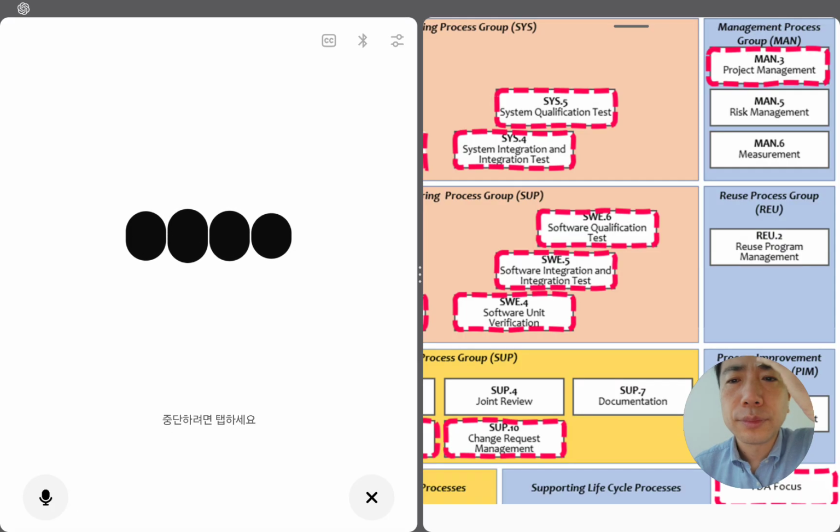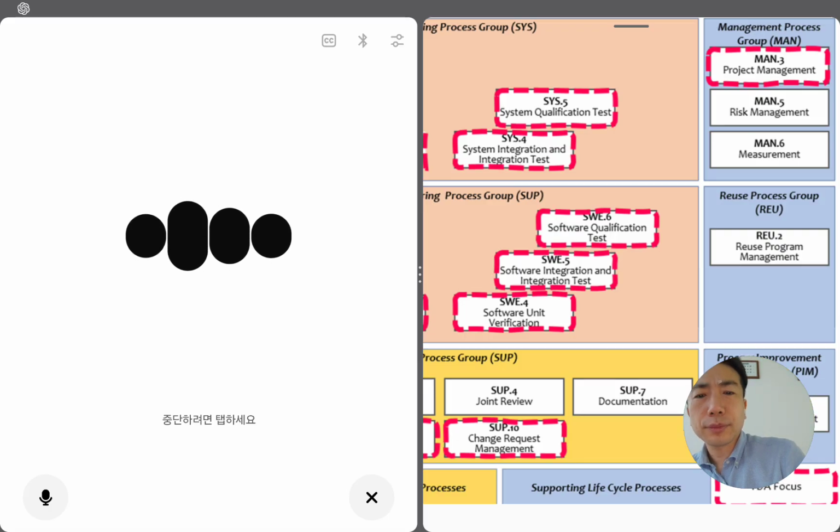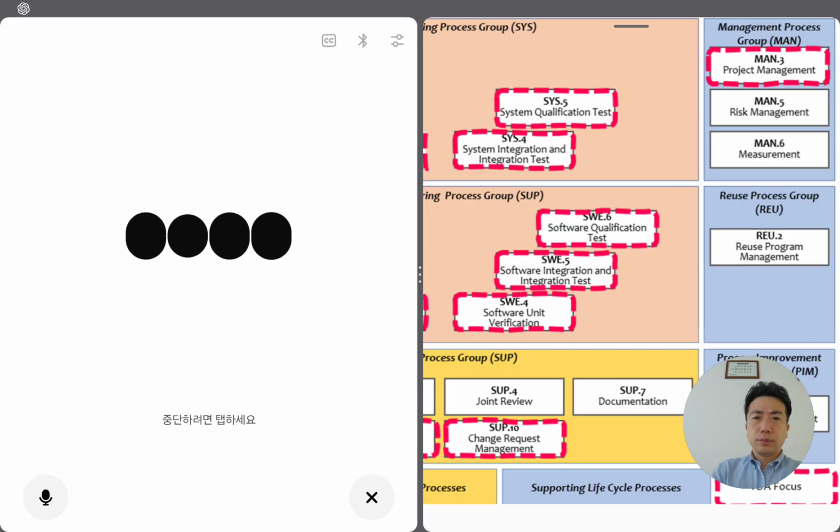You can see the code in our conversation history. How to use, simple, slow steps. 1. Paste into Excel. 2. Add a column status, e.g. draft, in review, baselined. 3. Add a column next action and date to keep momentum. 4. For each row, confirm owner, path, version, baseline, date. 5. When you baseline, remember your sentence.